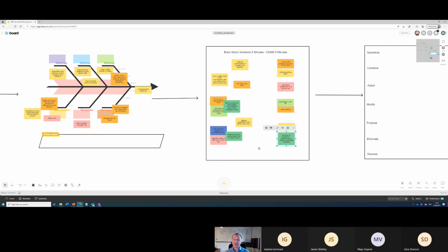And that's the art then of modifying, because often you'll get, team building is another good one. Great team building, great statement. How do you modify that to then become a tangible solution? Well, the modification might be assign somebody to set up a session where you do a bit of team building. Then it becomes a solution. See the thought process behind it?